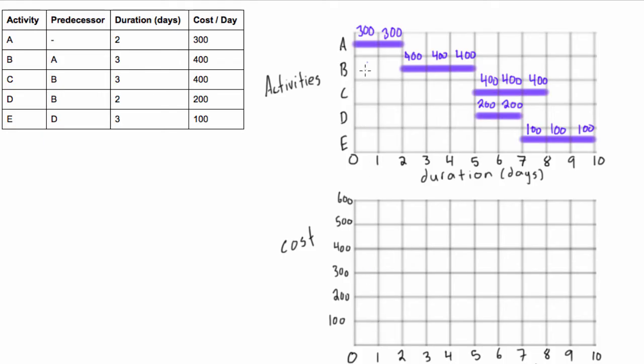So let's take a look at day one. Day one and actually day two are each going to cost us $300 for those days, so we'll find $300 here, so for day one and day two, there we go, we got $300. Let's make that line a little bit thicker while we're at it just so we can really see this.